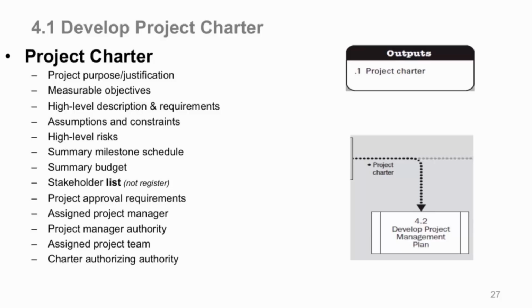Project approval requirements, who's authorized to, on your change control board, for example, who are the people that will review and approve change requests and sign the charter, and that should be at least the stakeholder. It could be the project manager also. It could be the manager of, say, a department that's the benefactor of the project deliverables too, could sign the charter, but at least the sponsor.